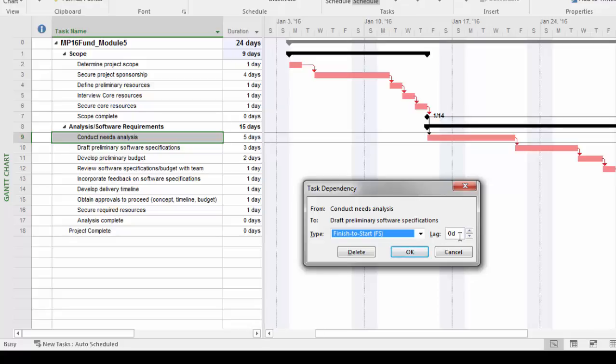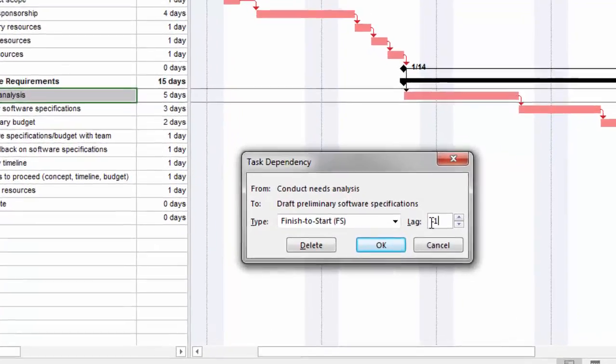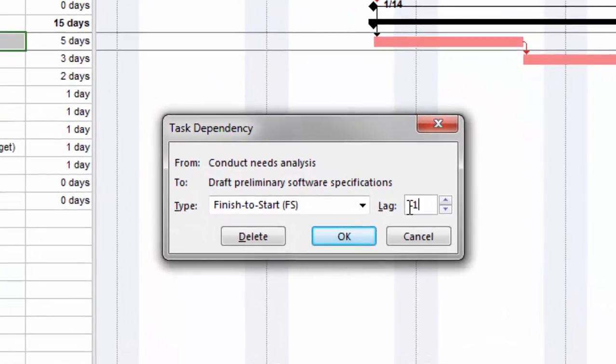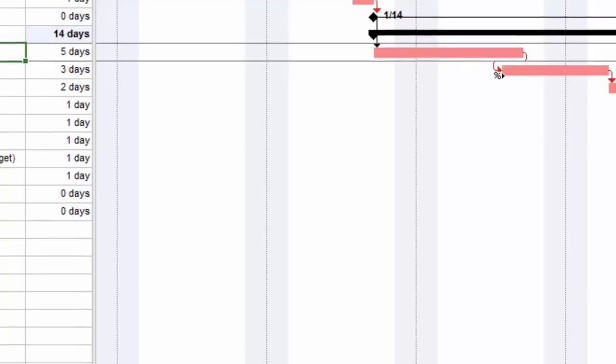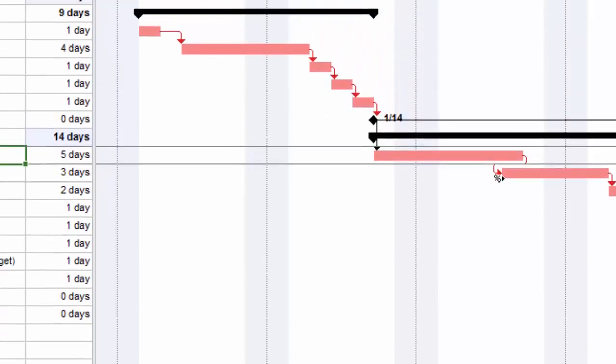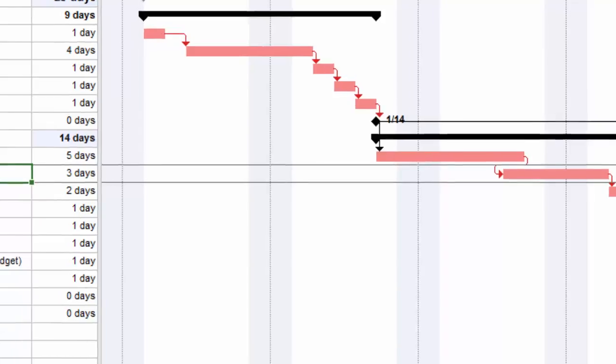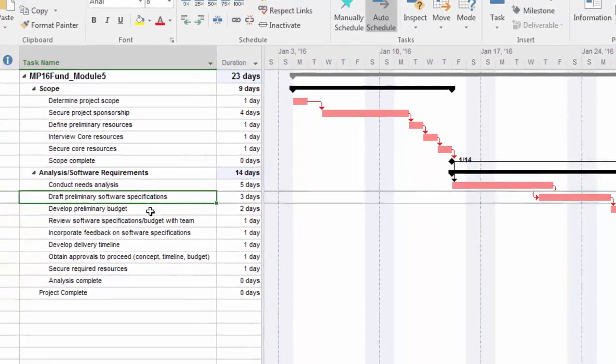It's really just a matter of typing in negative and that value. In this case, I'll do one day here and click OK. Notice the overlap pulled everything back to indicate that we can actually start drafting the preliminary software specifications before we complete conducting the needs analysis. That's certainly something that would happen.